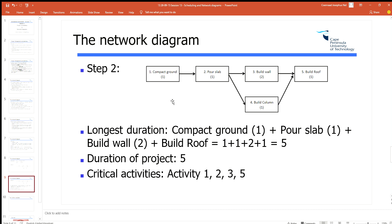Now I identify the longest route. This project has two routes: route one is activities one, two, three, five — and route two is activities one, two, four, five. For route one: one plus one plus two plus one equals five. For route two: one plus one plus one plus one equals four. So the longest route is one, two, three, five — that is my critical path, those are my critical activities, and the project duration is five days.